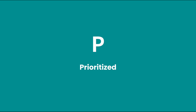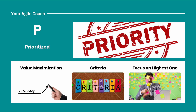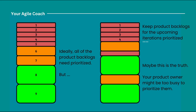Finally, the last P means 'Prioritized.' Ideally, all product backlogs need to be prioritized whatever criteria they use. One of the product owner's responsibilities is to maximize the delivery value for customers, and the prioritized ones should reflect this after discussion with teammates and stakeholders in a planning session. On top of that, prioritized backlogs make a team focus on the highest-value items, which gives them a sense of direction — knowing where to go. However, in most conditions, not all product backlogs are prioritized because your product owner might be too busy. I suggest you prepare sufficient prioritized backlogs for the upcoming two planning meetings and leave others unorganized, but maintain their priorities as often as you can. There are many factors determining how a backlog is sorted — maybe immediate cash flow, retention rate, or even just pursuing a short-term marketing effect. All of them are based on the results you want to realize.